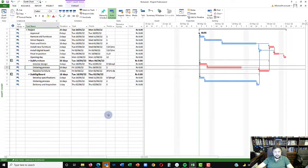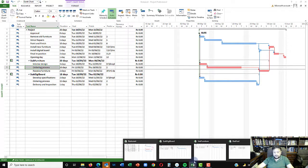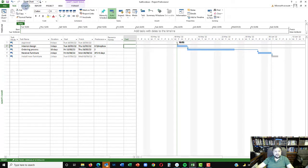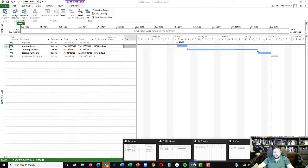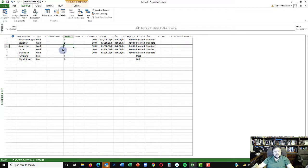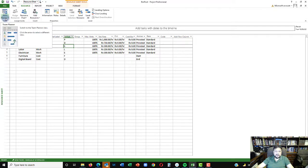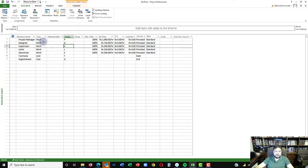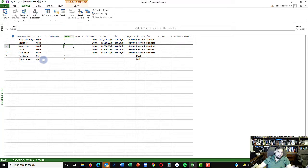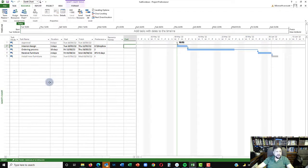The next step is to put resources. Let's go to the furniture sub-project and go to the Resource tab, where you have the Resource Pool button. First, let's look at what the resource pool looks like. When making the resource pool, you create a project file without any activities — just go to the resource sheet and enter all the resources you want to share across projects. This file controls resources for all the other projects. Now let's assign the resource pool to the furniture sub-project.